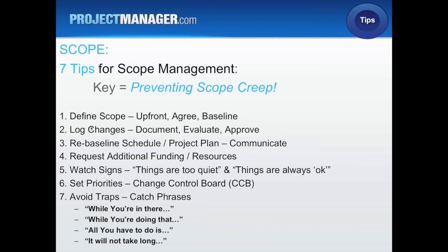So if you add scope, it could be that you need some maybe specific resources. It could be people resources. You might need additional equipment. You might need additional buildings. It depends on what is associated with that scope, but generally you're having to add things that need to be funded. So you need to identify it, you need to scope out the funding, you need to get it estimated and get that budget approved.